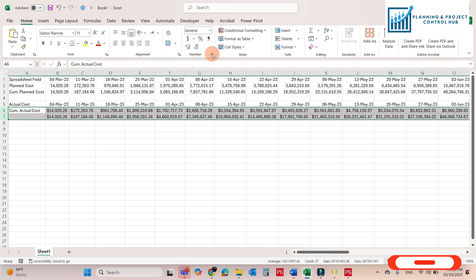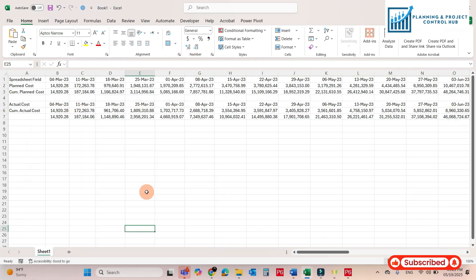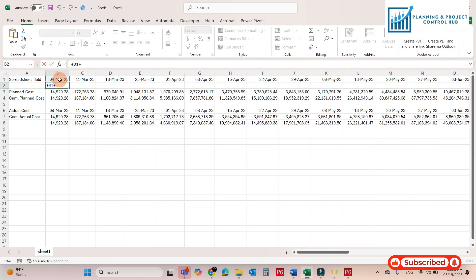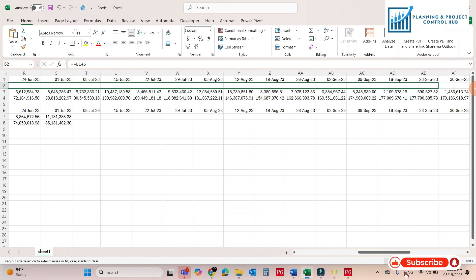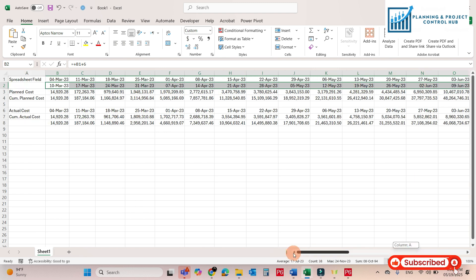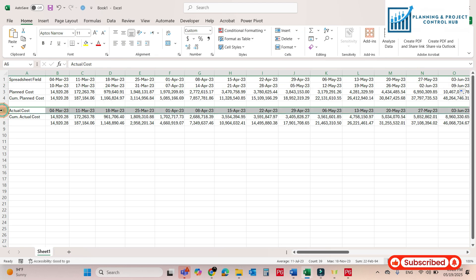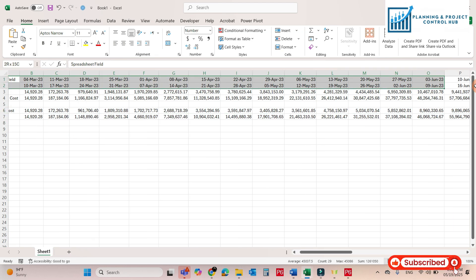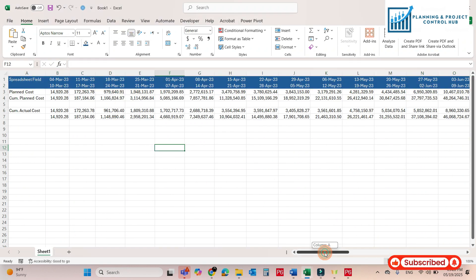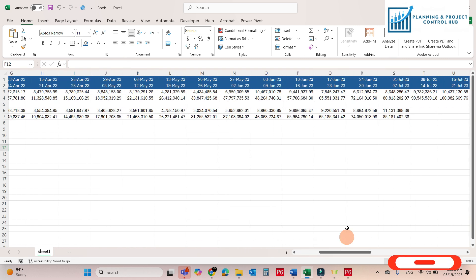First of all, change the numbers format. Now one thing I want to show you: Primavera takes the week start date, so we have to add here the week-end date. Add here Weekend — use plus 6 and move the formula forward. It will give you the time period from the week start up to the week-end. Do the same for here and just change the formatting of the date. If you see here, this project is already updated up to 7 July, and we have taken the data up to 7 July.